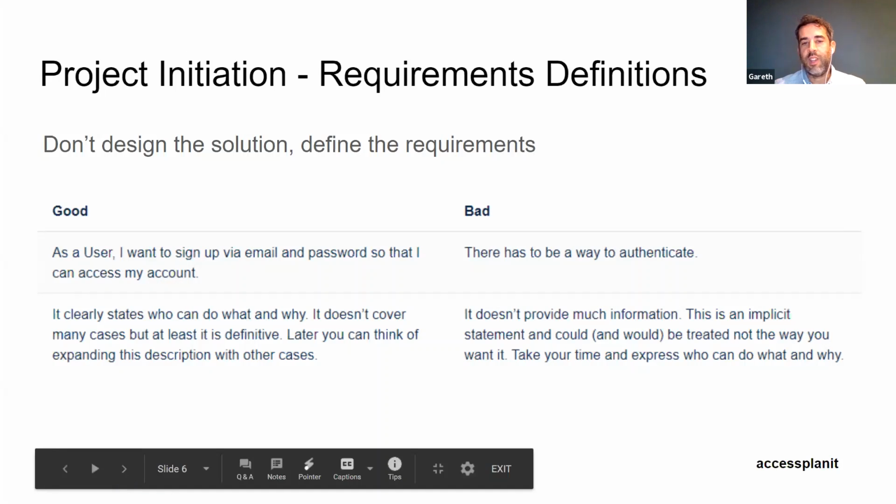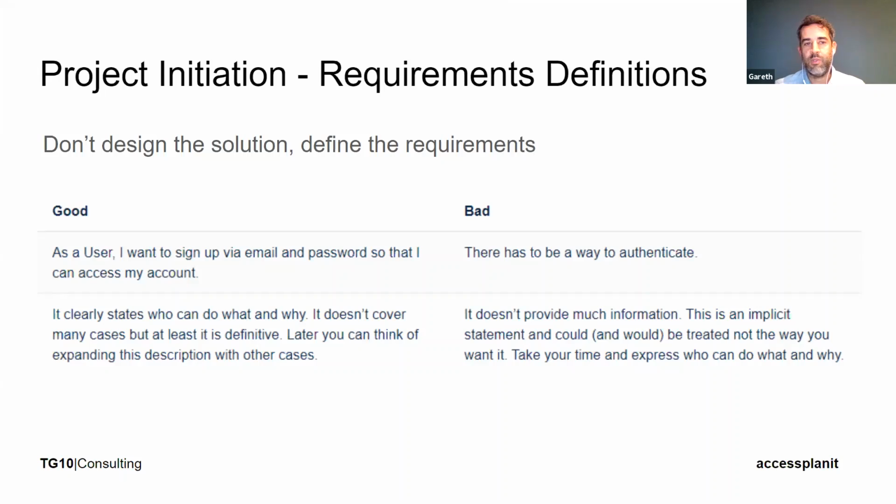Yeah, and it's how you get to those requirements as well. So just following that process, you really need to take a good look at the as-is. Really try and understand what is happening now, map out processes, get a real good feel for where the problems might lie, because it's really tempting to jump straight into a solution, to say this is what we need, this is how we want to do it.